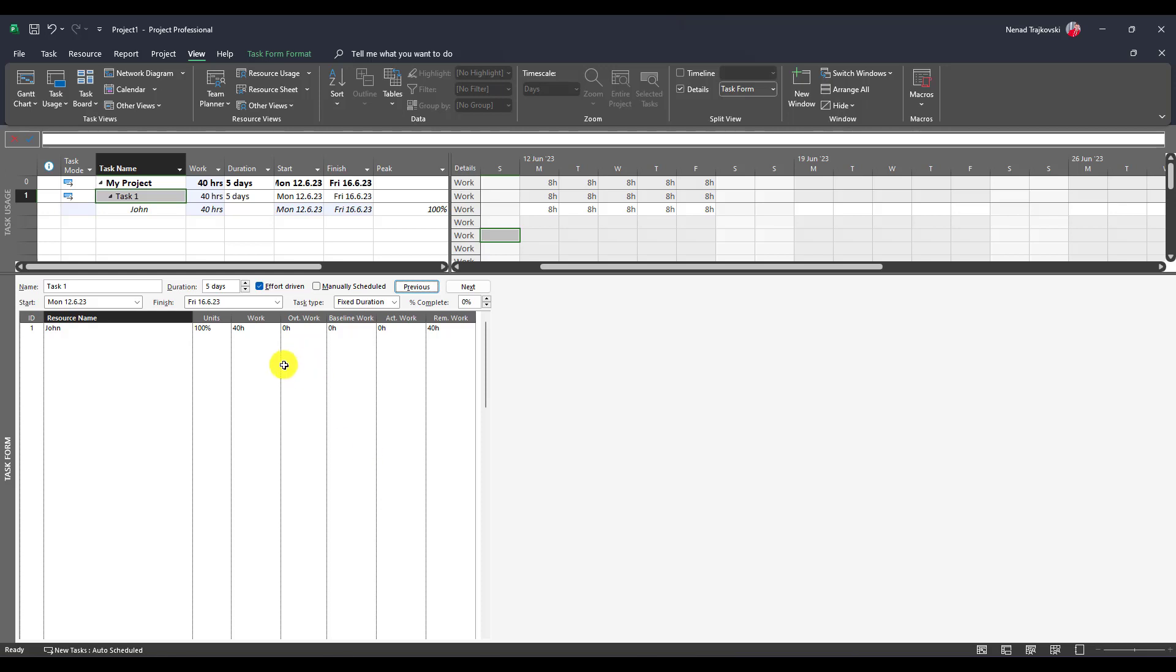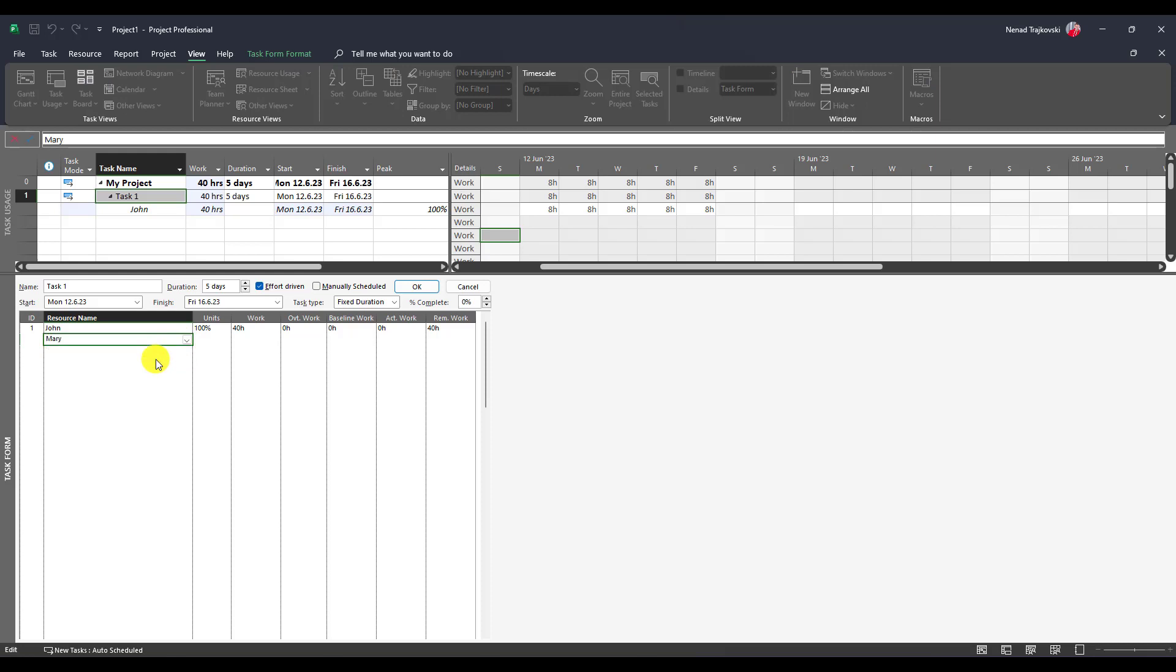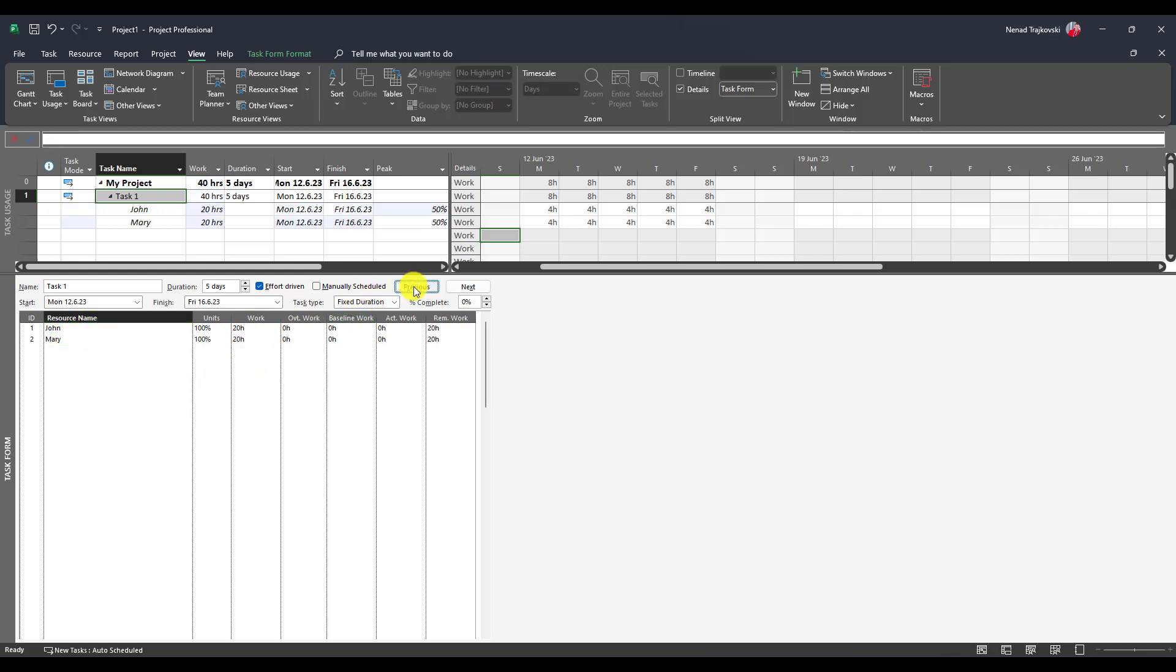Now, since it is an effort driven task, when you additionally add—not at once, but additionally add—for example Mary, Mary will split her work between her and John. I'll click OK. As you can see, Mary is going to work 20 hours, John is going to work 20 hours, but units are 100%.